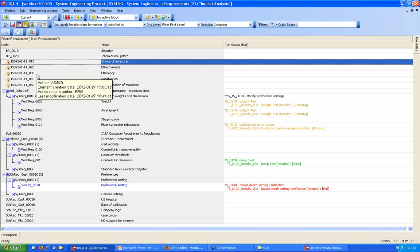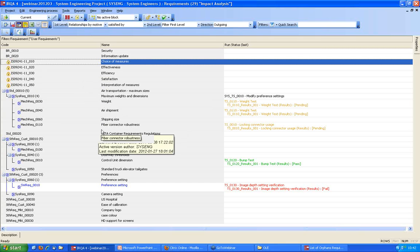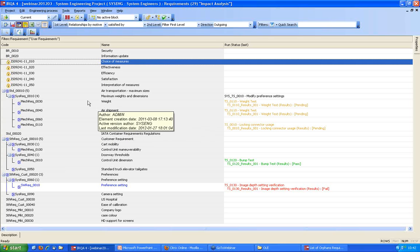So what you can do is create a library of requirements, let's say for this particular standard. When you have a project that needs to apply that standard, you can push, or publish, those requirements in your project, and then they'll be made available, and you'll be able to start linking to them. So these requirements are really requirements reused from other projects. In the tool, it's really easy to create what we call components, which become part of the libraries of requirements, and then you can start publishing them in your projects.